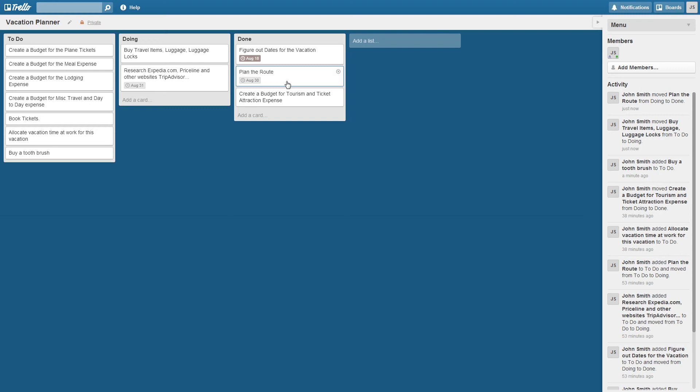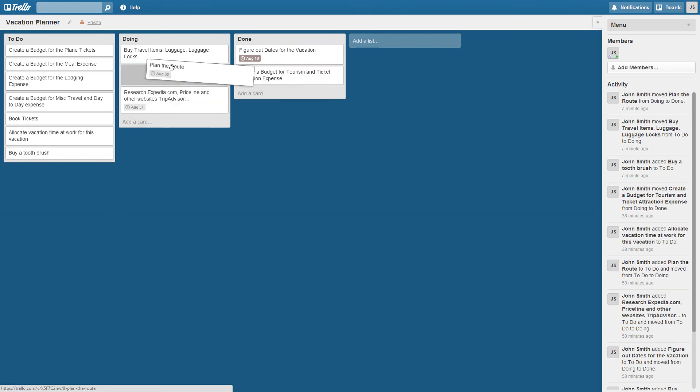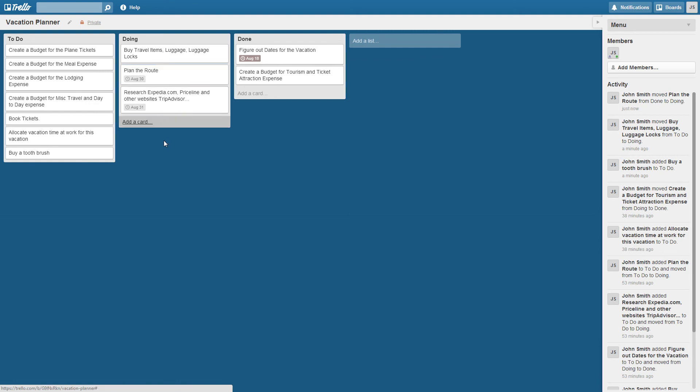So that's how you transition from one state to the other from things that are really a backlog of items. You have to do the to do list to the doing and then to the done. So maybe I'm not so done with the plan route and I have to drag it back.